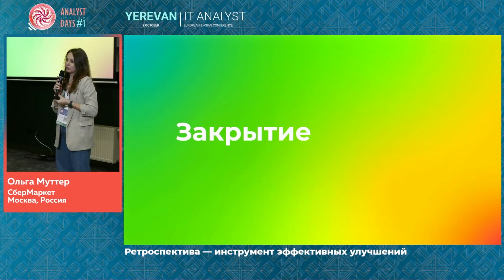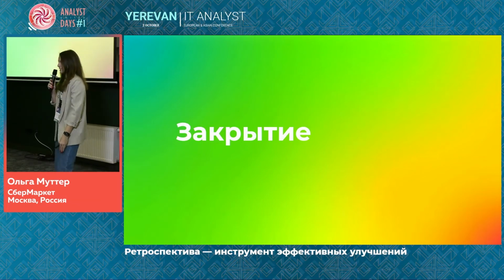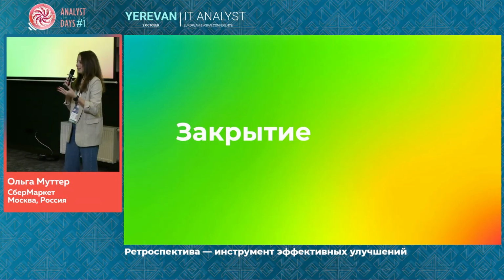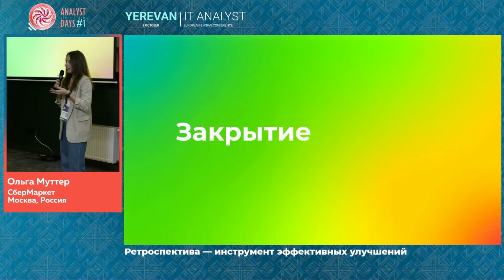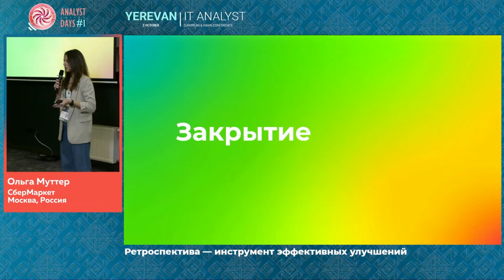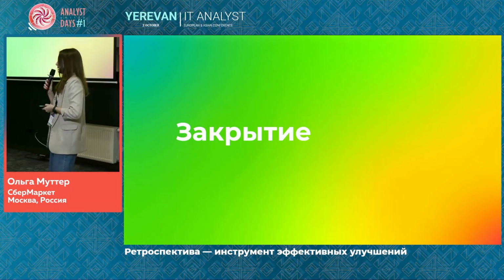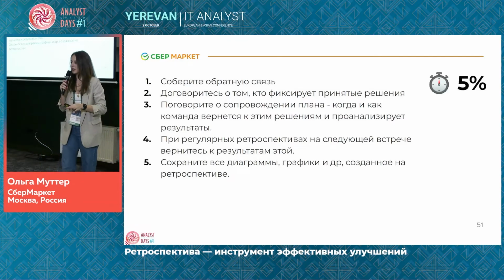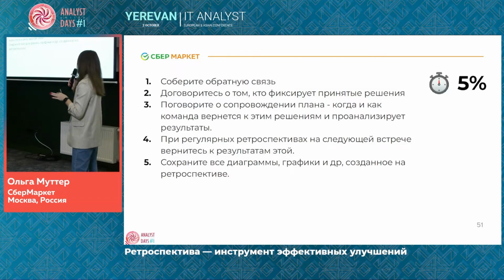And closing of the retrospective, people tend to forget about this phase. We discussed everything, we invented, we suggested ideas, that's it. No, this is not good. We need to understand what was happening during these 1 or 2 hours, whether this retrospective was efficient or not. You need to understand whether proper people attended the retrospective. That's why closing of the retrospective takes the same amount of time as the opening.